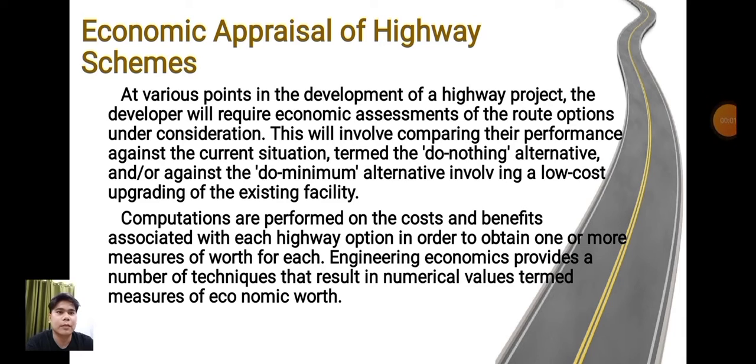Economic appraisals of highway schemes. At various points in the development of a highway project, the developer will require economic assessments of the route options under consideration. This will involve comparing their performance against a current situation, termed the do-nothing alternative, and/or against the do-minimum alternative involving a low-cost upgrading of the existing facility.